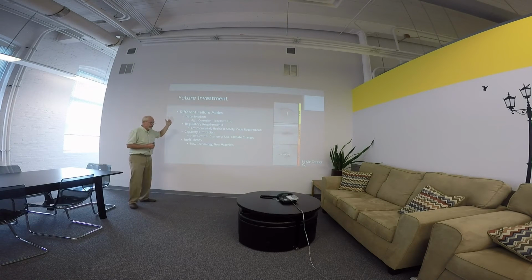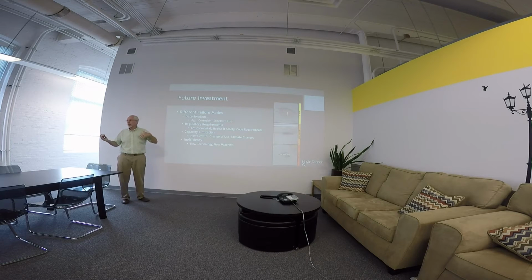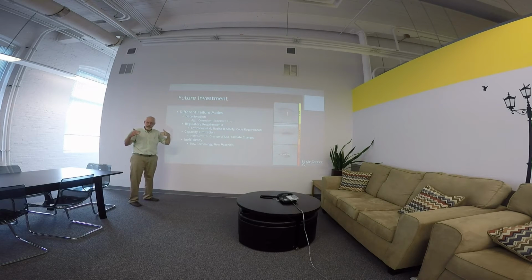So with that video, the failure mode was capacity. What you need to understand, and it's important when you're doing a capital improvement budget, is why you're doing that capital improvement budget. Is it because of deterioration, excessive use? Is it regulatory? You're upgrading the wastewater treatment plant, and the failure is you're no longer meeting the new EPA regulatory requirements. Is there a capacity limitation?